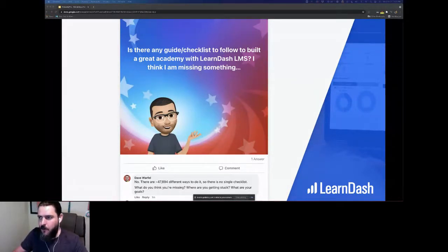So not that a forum is a difficult ask, but if you're doing it blindly and you don't know what all the features are, a forum can be an easy 40-hour project added to your LMS. So just something to keep in mind that every little feature, even though it might be small and very powerful, will start to add up. And if you want that cohesive user experience, it's going to take a little bit more than just turning it on.